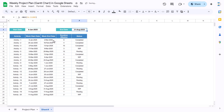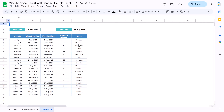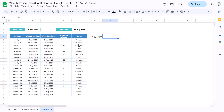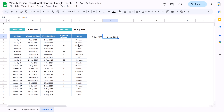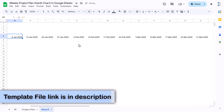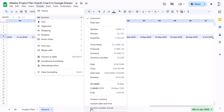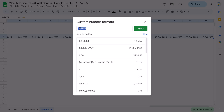Now we'll create the timeline. We need to insert more columns — we only have 26, so select all columns, right-click, and insert 20 more. For the first date, take the project start date. The second date is the first date plus 7, because we are taking weekly data. Copy and paste this across all columns. Then select the date range, go to Format > Number > Custom number format, and enter 'dd-mm' and apply.